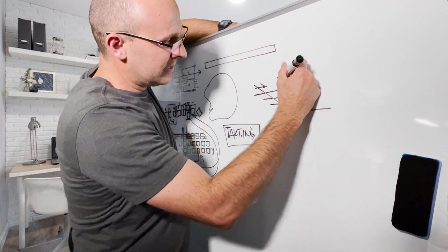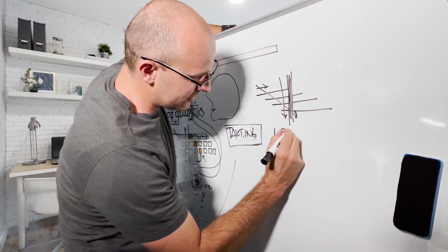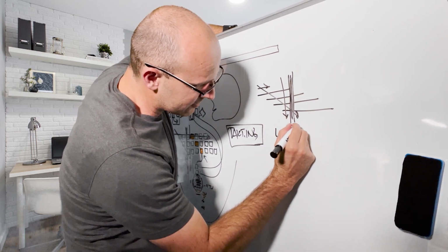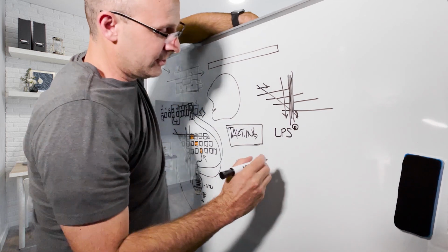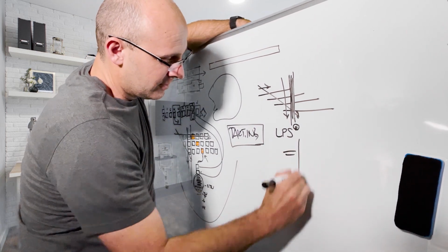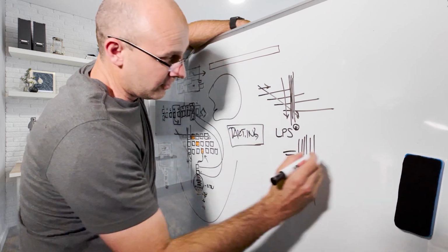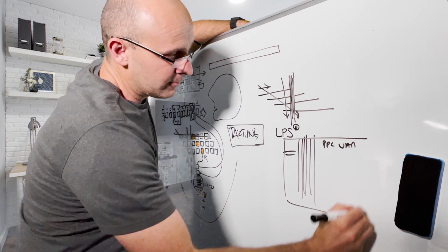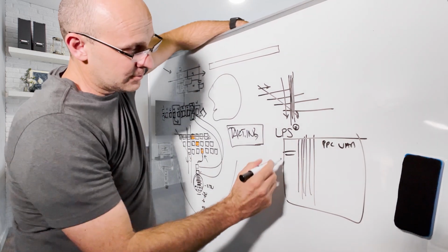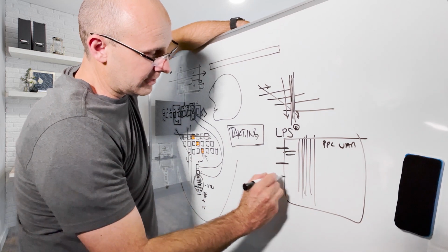So as soon as you get into this week, if you're using the Last Planner System, and I want you all to look at this, I'm doing the little trademark symbol up there. Boom, baby, I'm doing a good job. Okay, and you have one of those Monday, Tuesday, Wednesday, Thursday, Friday, with your percent plan complete, variances over here. If you have your weekly work plan that you're used to using, guess where you get your content for area 1, area 2, area 3.